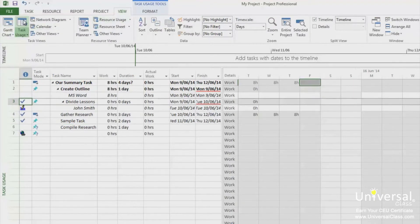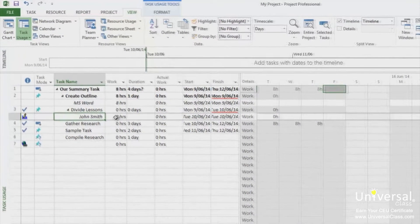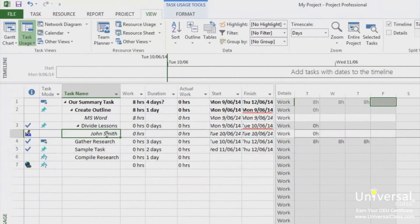Find the tasks that you want to track and its assigned resources. Resources are listed in a row below the task name, as you can see here. Type in the number of hours the resource was used.